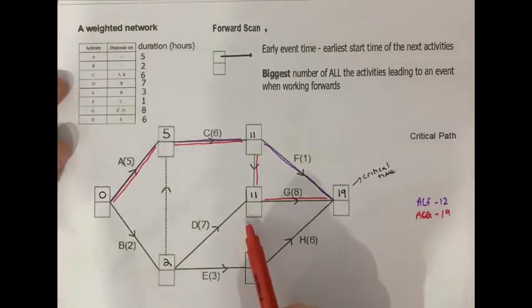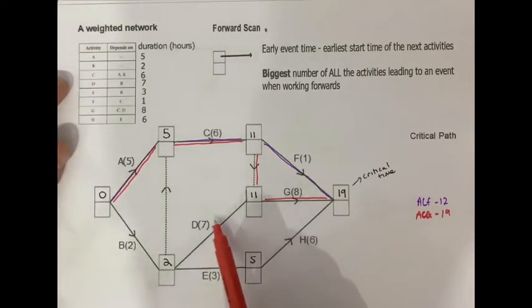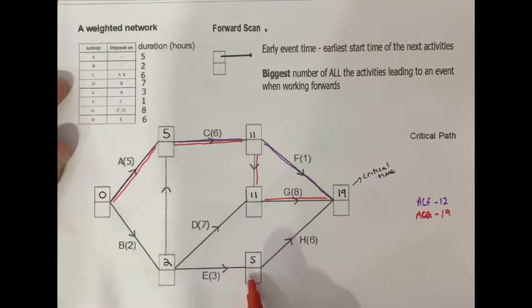So here, for example, I might have, I don't know what this number's going to be. The bottom number's always got to be the same or bigger than the top. If you've got a number here that's smaller than the top, you've done something badly wrong. So say this was 14, you'd have 14 take 7 is 7. Say this is 10, 10 take, look at this, 11, 11 take 3 is 8. You pick the smaller one of the two.